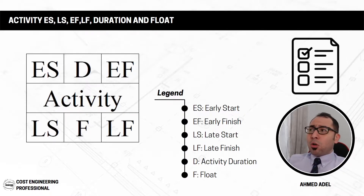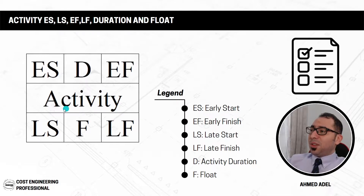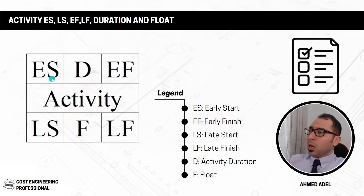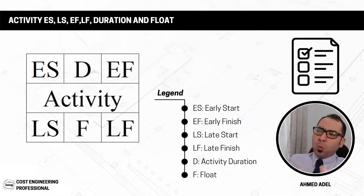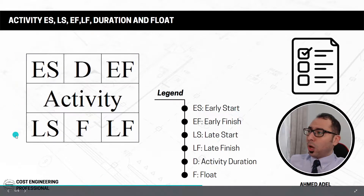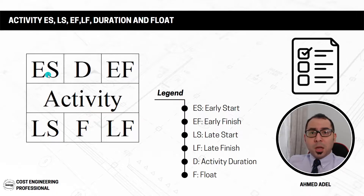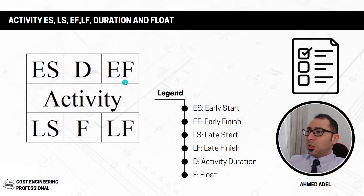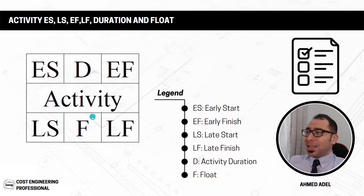When using CPM, each activity is represented in a node format. You will have the activity name in the center. The early start (ES) goes in the top left, the duration in the top middle, and the early finish (EF) in the top right. On the bottom row you'll find the late start (LS), the late finish (LF), and something called the float. Let's now go through each of these definitions.